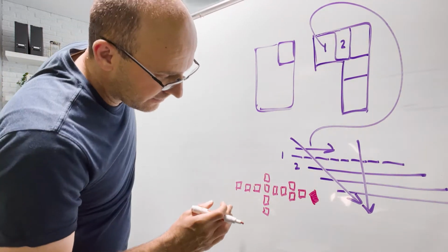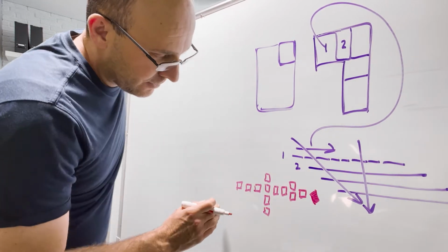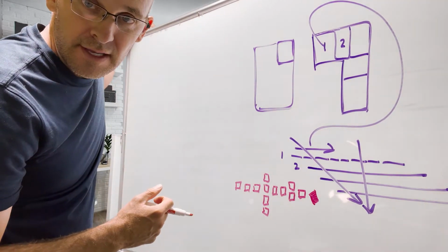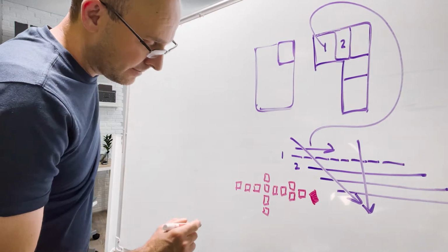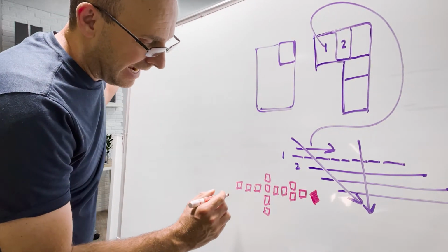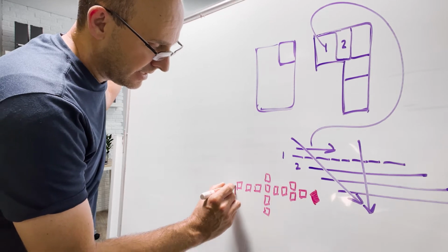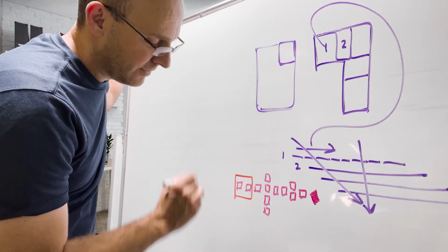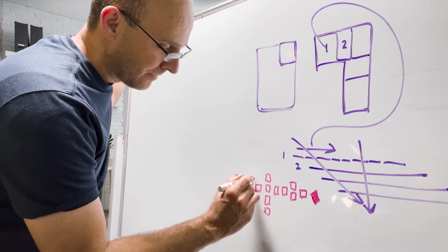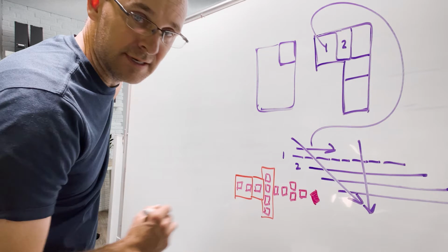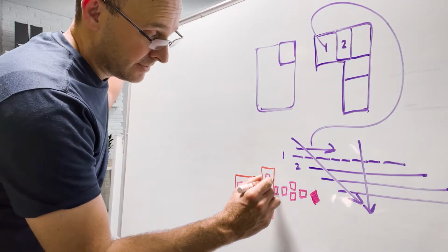When the Germans do takt planning, they will actually have the work steps and the work packages, just like a pull plan here, in detail like this, and then they ask themselves, what gets packaged into takt trains? Not takt trains, takt wagons. So they might say those two fit nicely into a takt wagon. This one fits into a takt wagon. All 4 of those, because they happen at the same time, can fit into a takt wagon.